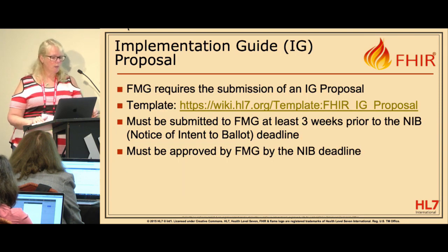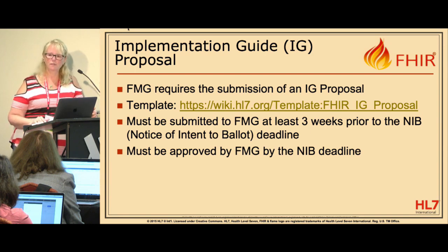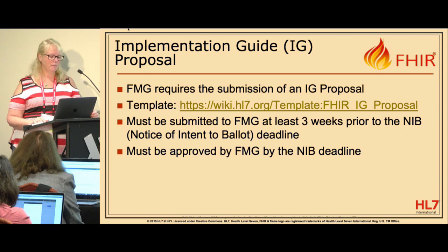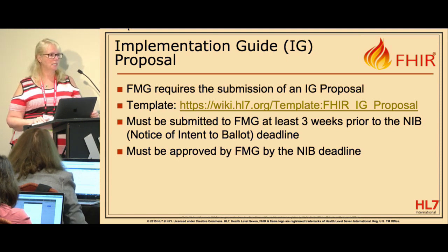Okay, the IG proposal, there is a template on the wiki, the link is there. I don't think that's moved to Confluence yet, Lloyd. And that has to be submitted to the FMG, Fire Management Group, at least 3 weeks prior to the NIB, and it has to be approved by the NIB deadline.